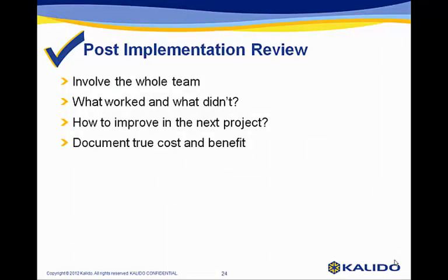A valuable exercise to perform at the end of each project is to have a post-implementation review. Just like we're not going to get the business model exactly right the first time round, we're not going to get the development process right the first time round. It's valuable to assess what portions of the process worked well and which portions need improvement so that the process can evolve over time to become more efficient. This is also a good time to document the true cost of the project as well as the perceived benefit from the user community.